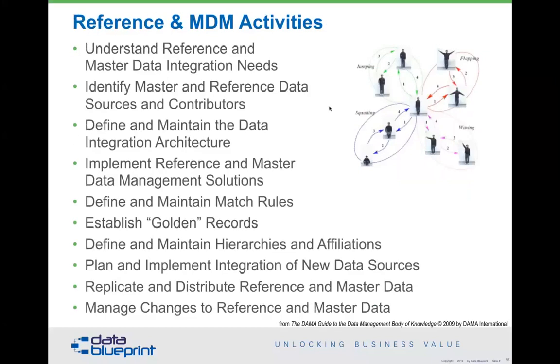So, next piece on all this, let's talk about some specific activities. The idea here is you need to understand master and reference data needs. Remember, they are different. Reference is much more technical. Master is much more broadly focused on the business. But if you don't understand what those needs are, it makes good sense to spend a couple of weeks running around the organization and finding out areas, in the case of this organization that I was describing to you a minute ago, where having the wrong doctor information caused problems. Okay, so they did a good job on the requirements.